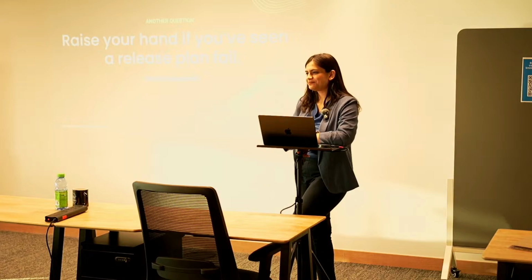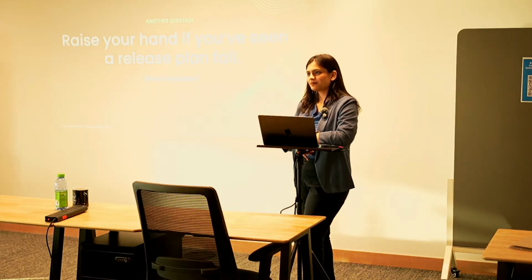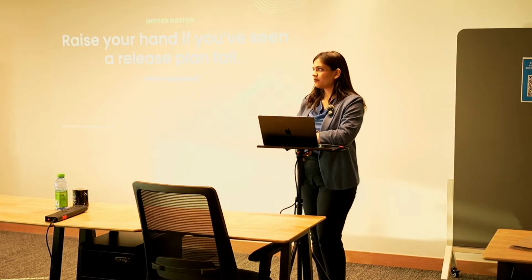Yeah, please go ahead. Sometimes a high priority item comes in, someone from the very high level of management or the business side says, we want this feature, and we want all the UAT team to focus on this rather than the usual in-scope items. That is one of the reasons which delays the release. And also, if the UAT team is not satisfied with the defect resolution, and there are high defect counts and we are not resolving them on time, it can also delay the releases. Yeah, that's a great point.